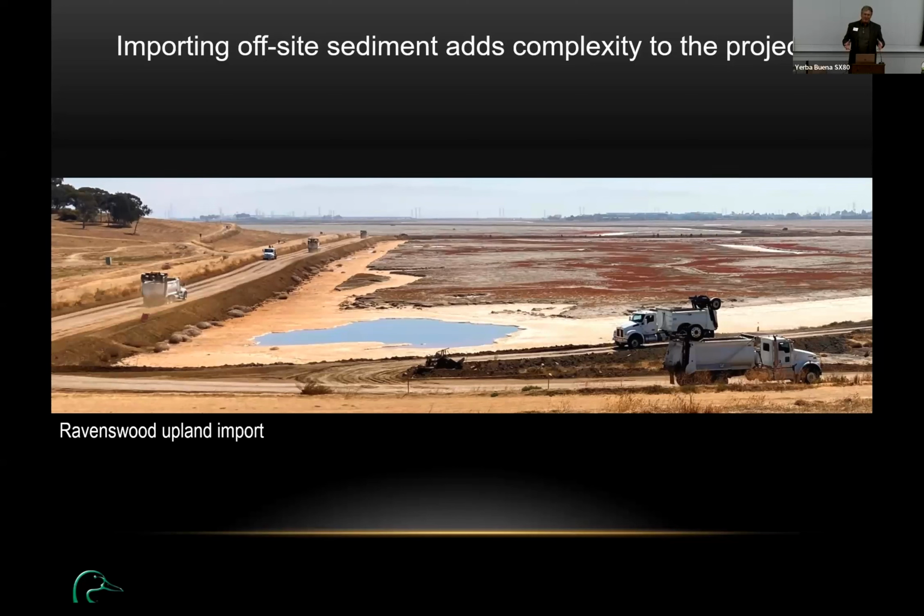But most of it comes from commercial development sites. And there you're losing control of your project because you're linking your project with other external projects. So now they're in control of the timeline, and their objectives are completely different than our objectives, right? Their time is money. They want to get rid of a waste product, and that waste product is what we're trying to get. And they would rather just pay money to move it off than to wait and work with us in order to bring it into our sites.